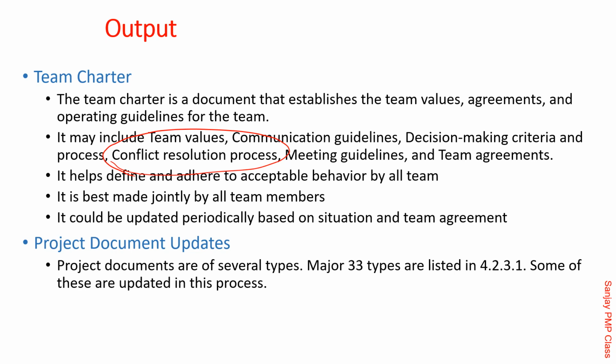First principle, step one. If Aniruddha and I are having some conflict as team members, the first process should be that we discuss, sit together and try to resolve it. Going to the project manager for that is not the thing. So the scenario-based questions, Aniruddha, they will throw a long text and very clearly try to say that someone was right, someone was wrong and so on. So what you should do?